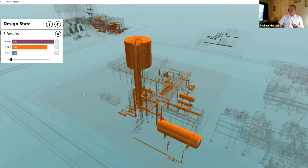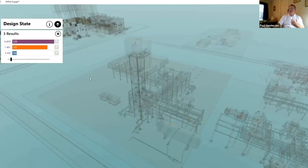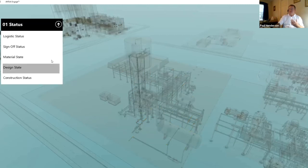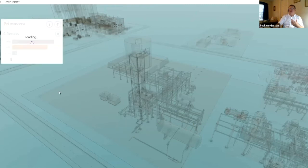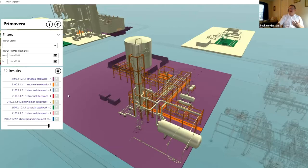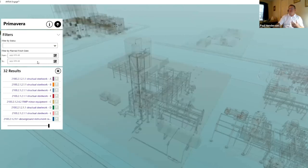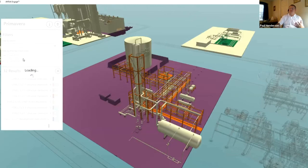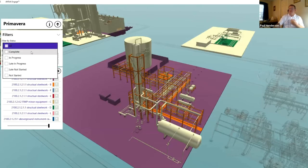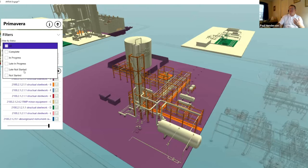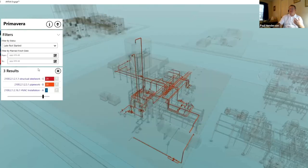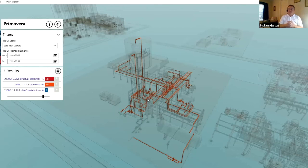Design state. If we wanted to look at design state, we could actually look at design state. We also can do scheduling so we can actually look at say Primavera in here and actually see what the status of information is, what our steel work is. We can actually put days in here. We can put what's finished, what's not finished. If we wanted to see what's in progress, what's late in progress, we could do that. Let's look at what's late and not started here and we can actually filter. So we can actually get a visual query really quick on my project and what is late and not started.